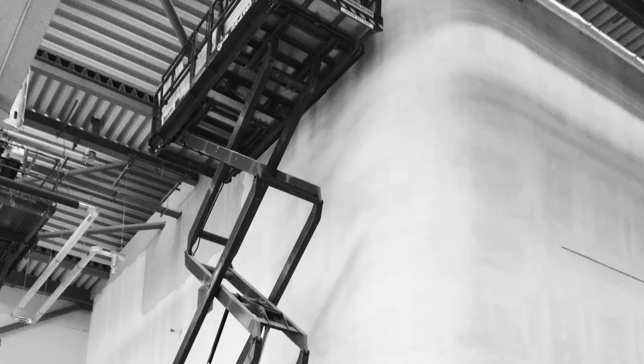We've got this full height expansive internal wall, which is quite an unusual specification, that needed to be constructed on time in amongst a busy construction programme. What the Rigidor products allowed us to do was to achieve this to programme and budget by being able to integrate in amongst other trades at the same time. So there's so much simultaneous action on site at the same time that we're able to do with that process, rather than needing to largely quarantine areas for a wet trade to progress through, which would have been the case had we been skimming these walls.